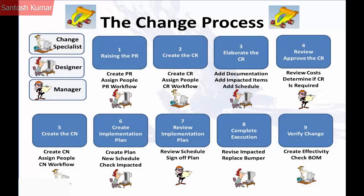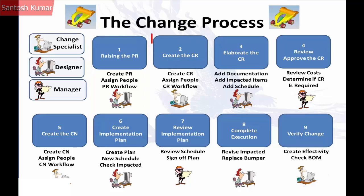Let's now review the whole change process for the Classic Car Company. The designer creates a PR for the bumper change, adds the problem bumper part to the PR, assigns herself as a change analyst and selects the change specialist, then initiates the problem report workflow. The change specialist then creates the change request which inherits the information from the problem report, assigns a designer to elaborate the change request and the appropriate change review board to review the request.